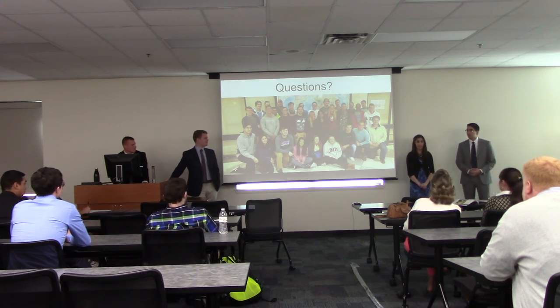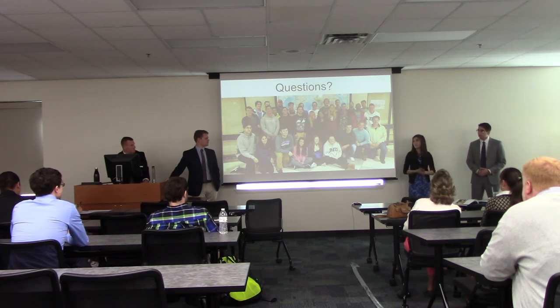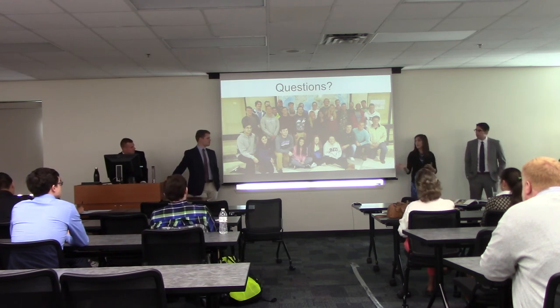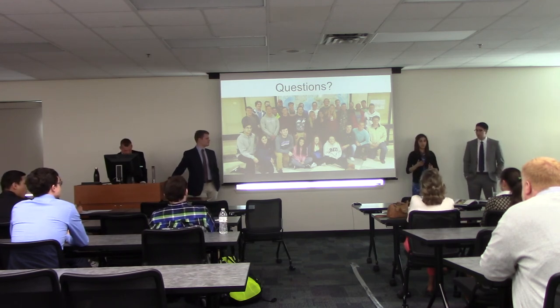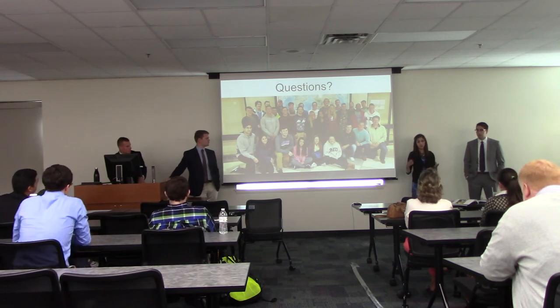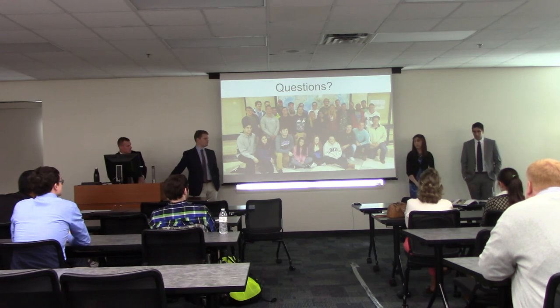To go off of that, I also think that the business team should have worked closely with the design team when they started developing the business model instead of later on. So the integration is important. While we are still very successful, I think it left some choppiness and hard communication, going off of what Nick said. I think it would have been a much better process if they worked closely together.